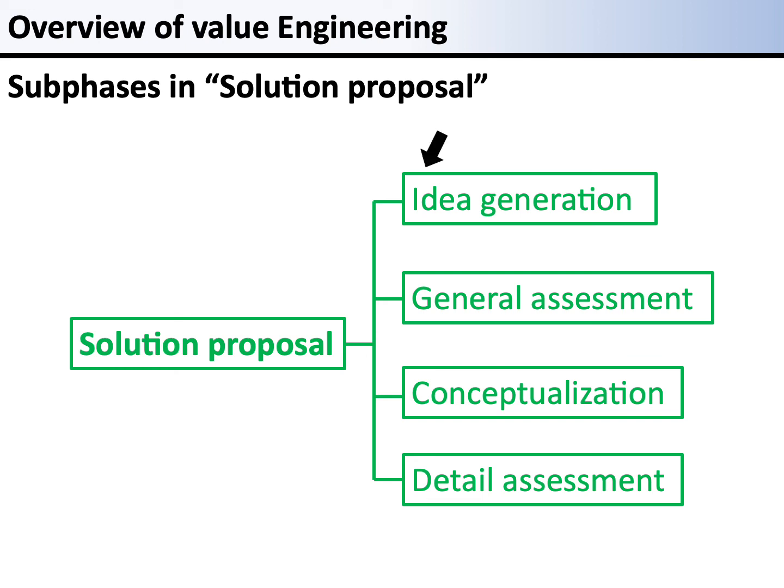At the subphase of idea generation, solution ideas are generated for the function areas of lower value. At the subphase of general assessment, we open-mindedly assess the generated ideas based on both economic and technical feasibility. Then, ideas that have potential for value enhancement are selected.